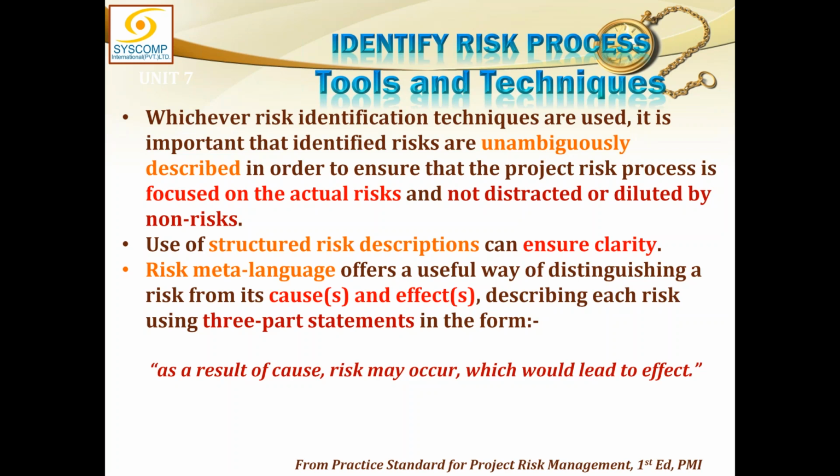You must be concise. You should not start unnecessary discussion on non-risks. Use of structured risk descriptions can ensure clarity, in the cause-risk-effect format. That is also called risk meta language. Cause-risk-effect is risk meta language, which offers a useful way of distinguishing a risk from its cause and effect, describing each risk using a three-part statement.